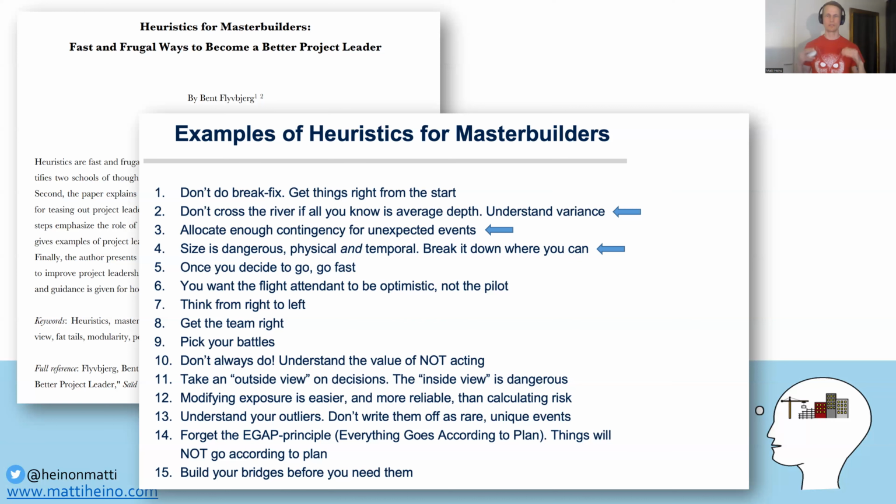And it's smarter to try and modularize it into smaller things. So you build one sub project and you make it work, and then you repeat the basic idea of that sub project in order to get the bigger portion of the project done. And this way build the thing up from bottom up, learning all the time from the mistakes you did from the previous phases or modules.